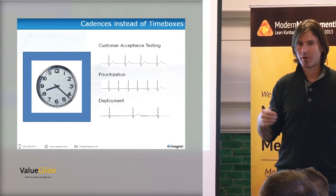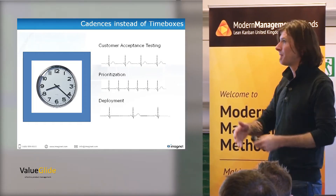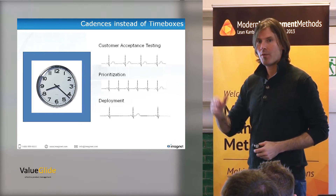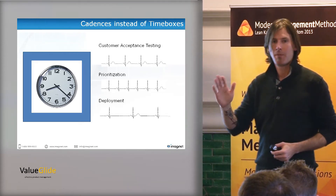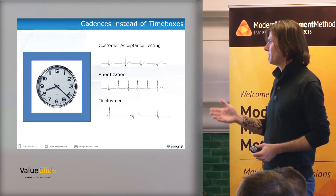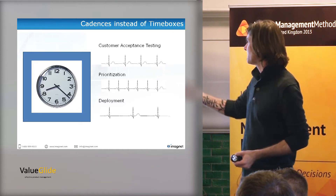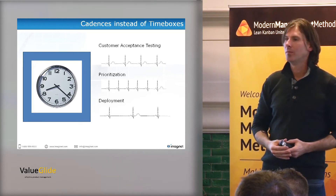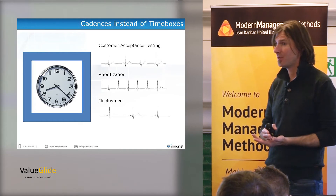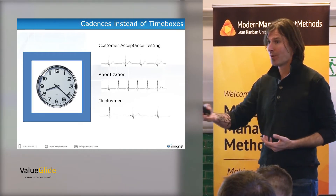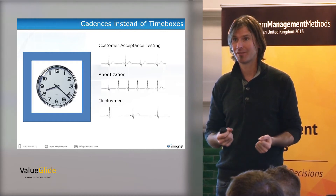Where Kanban gets the iterationless moniker is that it tends to be able to split cadences across activities. I want to do customer acceptance every two weeks, prioritization every week — and they'll meet up at some point. But cadences are still very important. That repeatability is important to human beings, and part of the reason Kanban exists is because we like heartbeats.